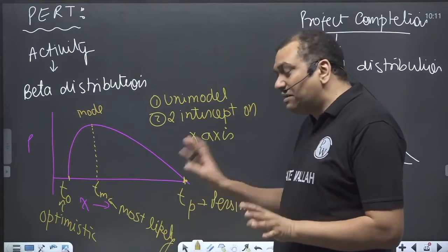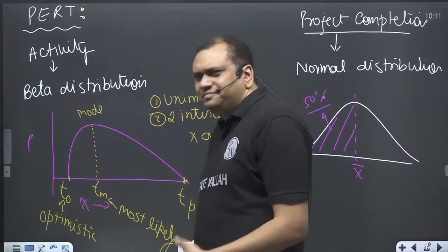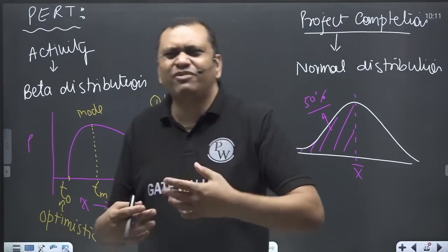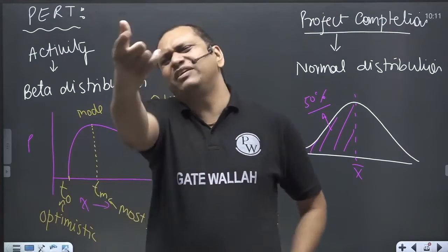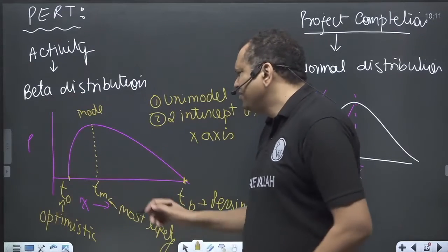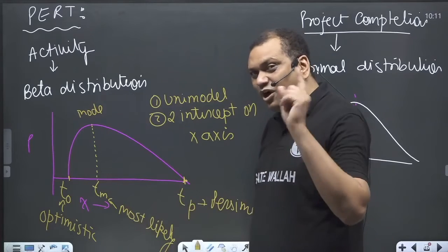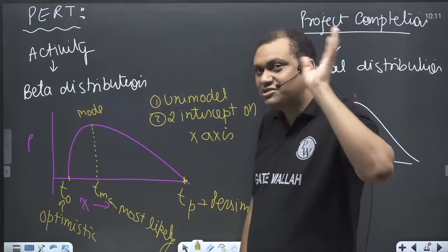Pessimistic time, optimistic time. But when the truck goes and comes back, you may face one or two difficulties. Only once he gets caught in traffic, only one time a puncture. So most likely the truck will arrive in this time period. So there are three times: optimistic time, pessimistic time, and the most likely time.